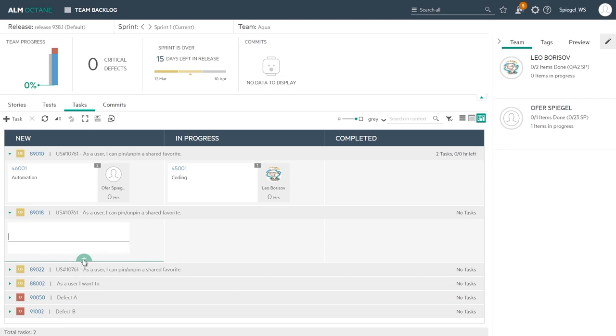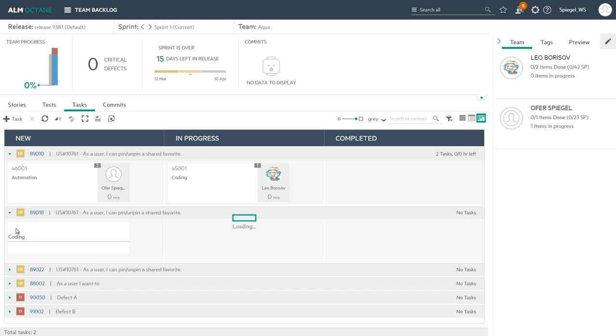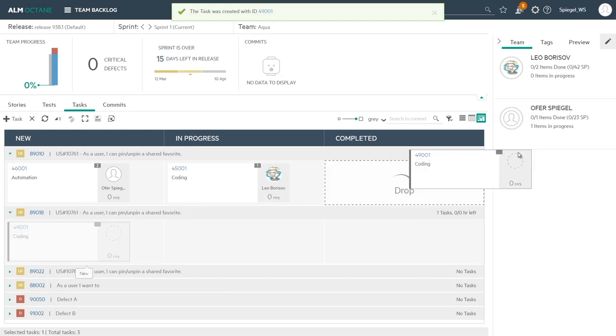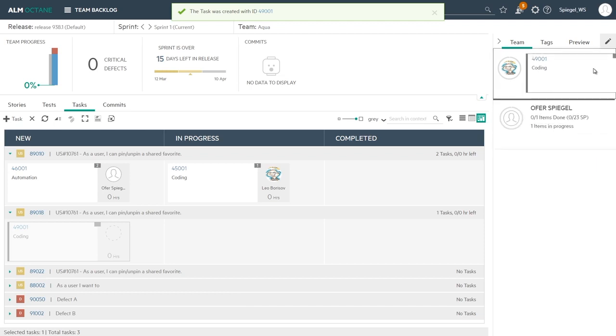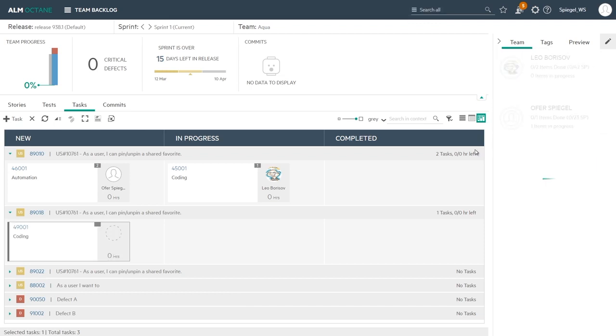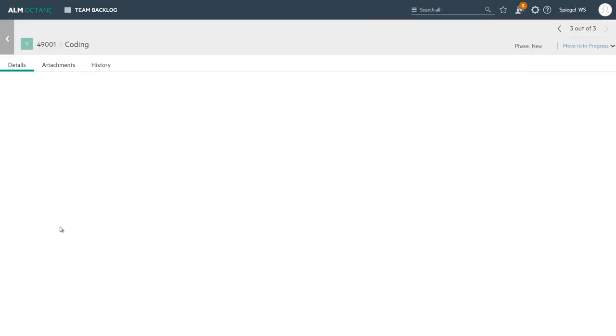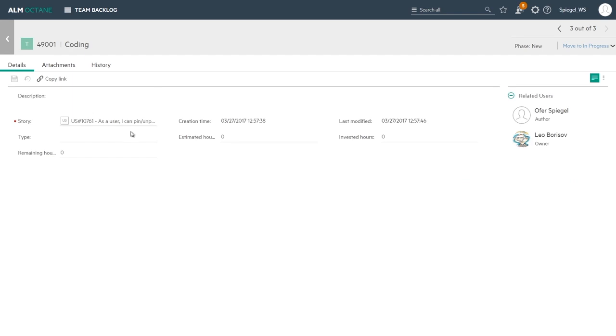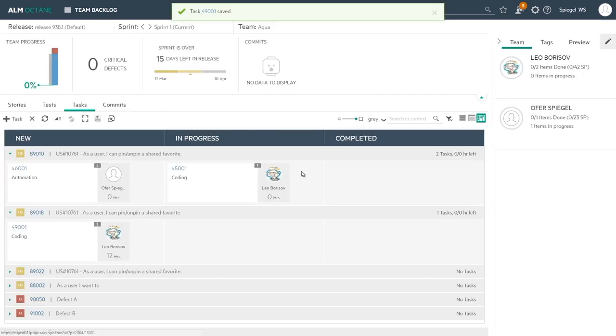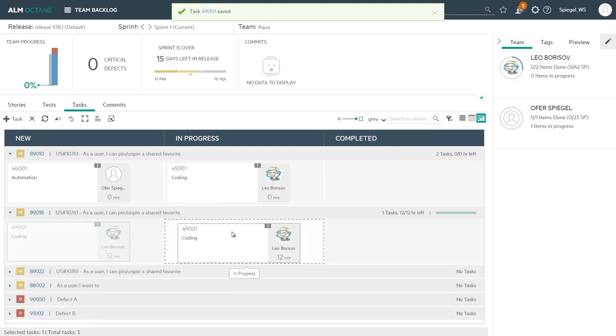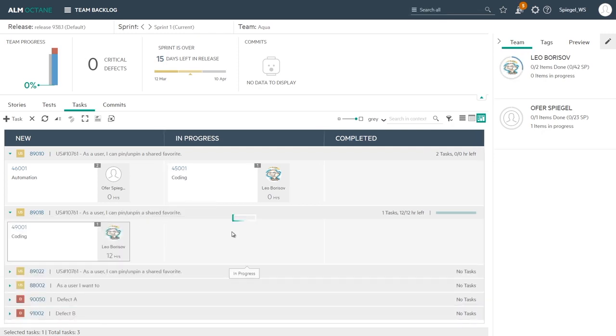If you work in a kind of a scrum style by working with tasks, you can work on that task board, add tasks, new tasks directly on the board to every story or a defect, user story or quality story. For example, coding for this story, I added directly. I can drag it onto a user and by that make the assignment. So Leo is now assigned to it. I can define what is the expected estimated hours that needs to be invested, and I can start working on it or begin to in progress.